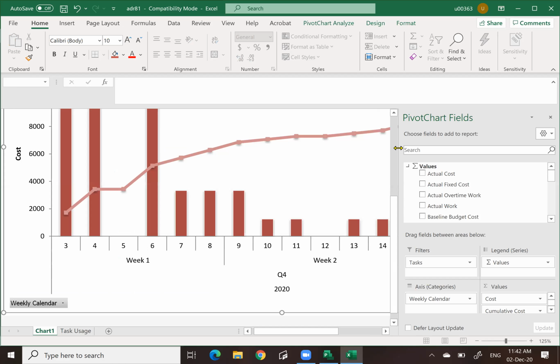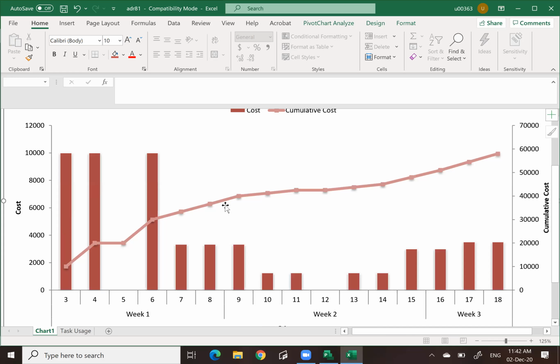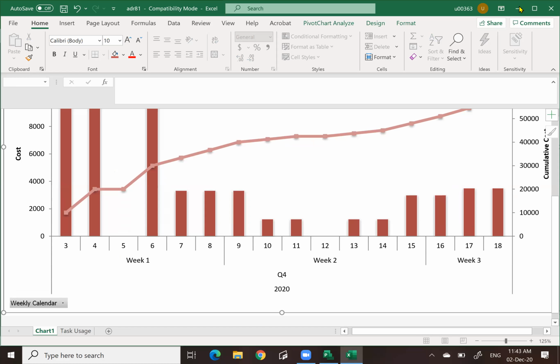Okay, you see, this is an example of the S-curve. It might not look like a nice S-curve because we just simply put whatever cost. In a real situation, this is the S-curve that the contractor and client look at in order to measure the progress of the contractor. But if you do not draw this S-curve nicely, don't worry, the data is already here. You can just copy this data into Excel and draw according to whatever design you want. You will get a better chart.